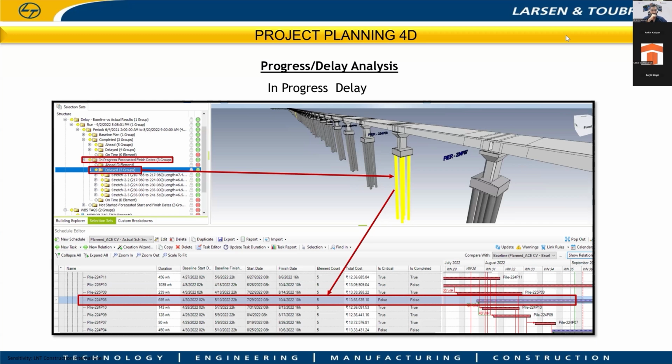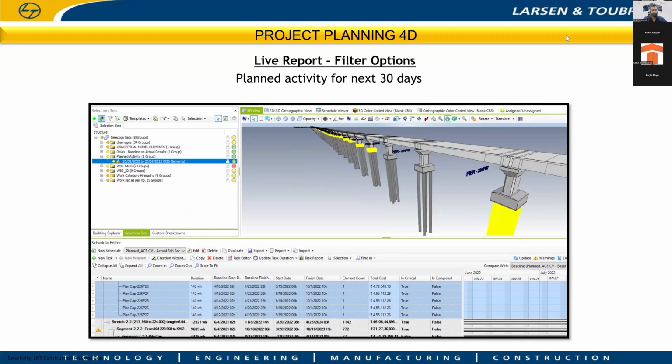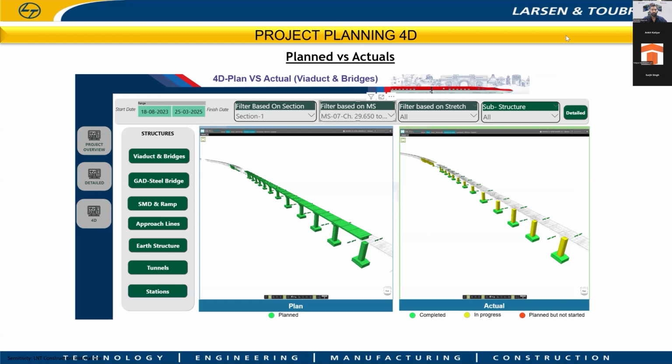Yeah, so just move forward. Once we ensure the QA/QC process and the elements are connected to the proper line items, it is good to generate the report. As I told, we used to have an Excel CDE where our model is pushed to the cloud so that it can be brought into the Power BI dashboard, which gives a clear picture to the management, where they can see the project progress monitoring through the Power BI dashboard.